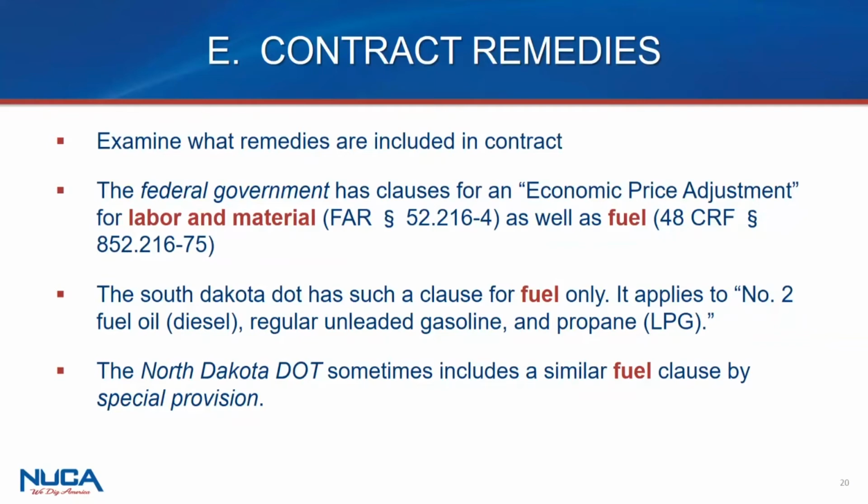What's important to recognize is something Shawn said earlier, which is if you're doing a federal project, the good news is there's clauses that are in there already with regard to this. And I think that's important to recognize too, in support of you when you're seeking to request inclusion of such a price or materials price escalation clause at the pre-bid phase. It's important also to note, hey, look, we're just asking you to do what the federal highway is already doing, for example, on their projects. So if it makes sense to them, it should make equal sense for you. And if you got any questions, certainly talk to them. But Federal Highway saw fit to include that. We just want the same treatment here as they found to be suitable.